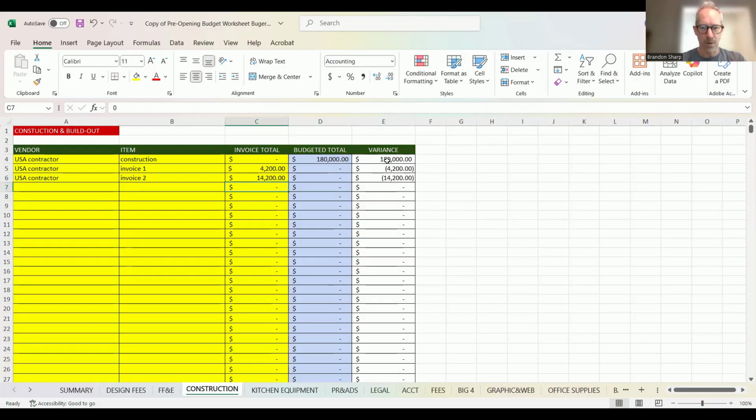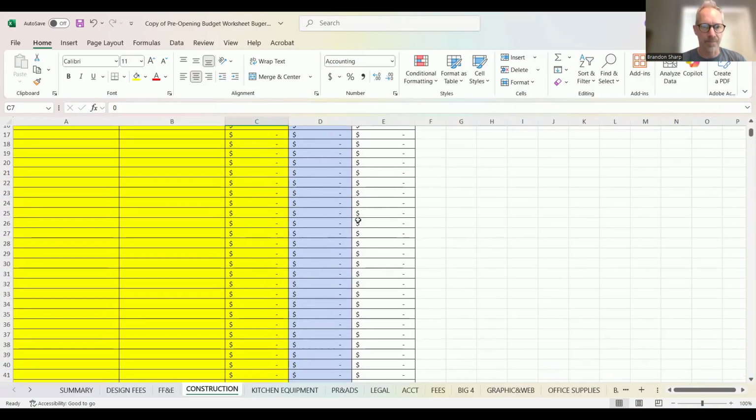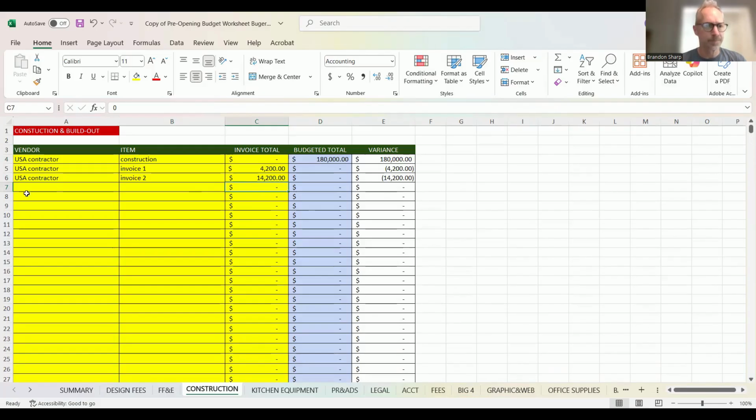Okay. And so don't worry about these individual deltas right here. You've got the contractor's quote right here, and then he is invoicing you against that quote. All right. So you can see the total, you're still 161,600 to the good down here at the bottom. And so as those invoices come in, you're going to put them in column C, and then they're going to count down, they're going to subtract from the budgeted total that you put in the beginning.